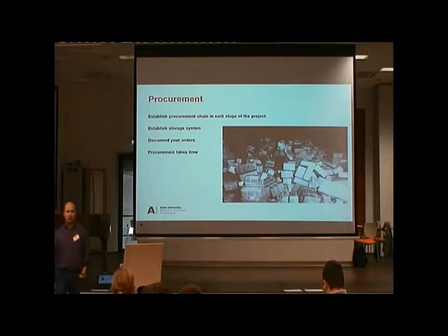Procurement. If you start to buy things, even off-the-shelf components, off-the-shelf subsystems, everything takes time. Everything actually takes much more time than you believed. And then the things start to roll in. You should have a storage system and handling system, and you should document your orders somehow to know what is going on, even just filing the papers or something. Very many projects are delayed because procurement takes time, and you cannot even foresee everything. That's why the schedules should also be made with margins. So you put some extra time everywhere.